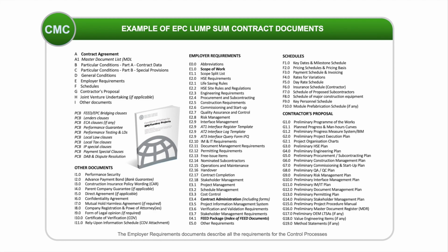Contractor's proposal is basically a technical proposal which describes how the contractor is going to execute the contract. The contracts manager and/or procurement manager prepare the invitation to tender package, including the instructions to bidders about the tendering process and proposal submission requirements. This ITT is sometimes also referred to as ITB, RFQ, or RFP.